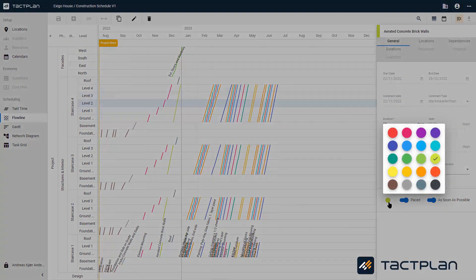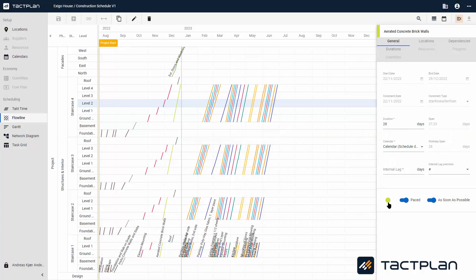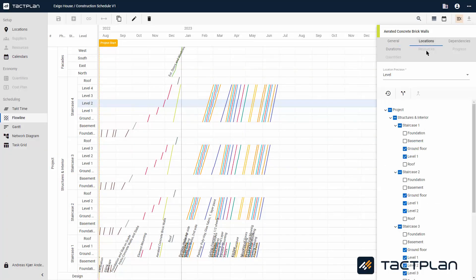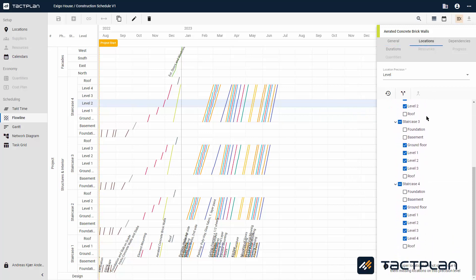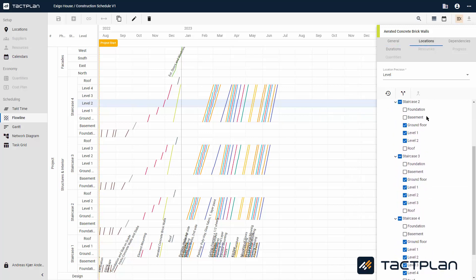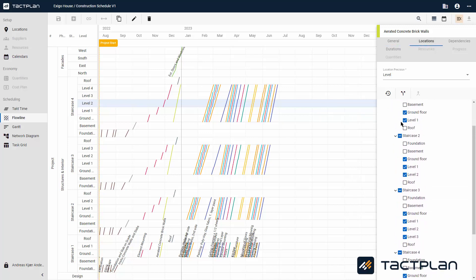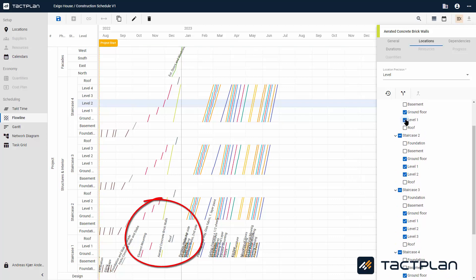If you click here, you can choose which color the task should be. If you click on Locations at the top, you can see where your tasks appear. You can select locations and turn activities on and off, and also change their order, just like shown here.